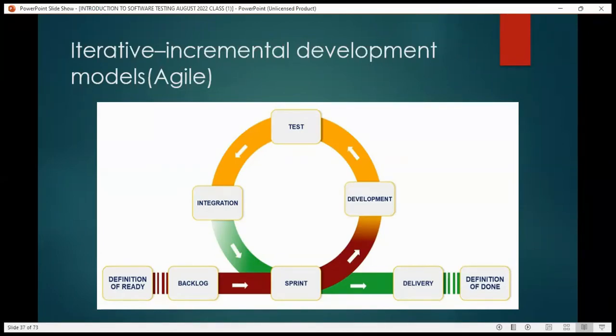All these things are key when it comes to agile. Sprint, you'll be hearing sprint, sprint, sprint, and I told you sprint in the proper agile way, in the manifesto, is meant to be fortnightly, which is 2 weeks. But it depends on the organization, the team, your deliverables. So it could be adjusted, some will do 2-3 weeks, some will do 4 weekly.